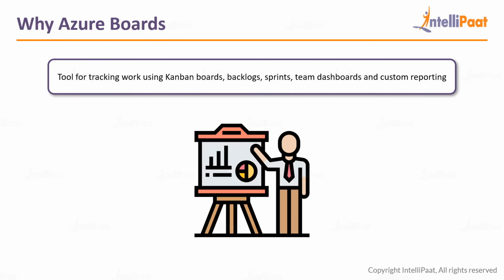While assigning it to them, that task can also be mailed to them. So when you assign it, it will be mailed to them that this task has been assigned to you. You can also mention the priority of the task, and the sprint period for the task. The sprint period is basically, in companies, they might have 10-day or 15-day sprint periods. That is, within 10 days, the issued tasks within that sprint should be completed. So that's what happens there.